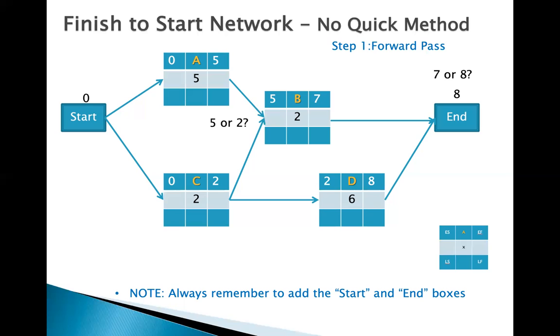We can answer some of the questions that I have for you here. So what is the earliest start of activity B as in boy? Why I'm putting this question right now in the middle of the example is because on the exam, you can have those types of questions. What is the earliest start of activity B? You cannot define the earliest start of activity B until you finish the forward pass.